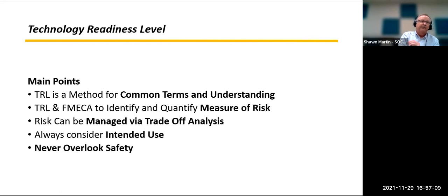You identify it first, you understand what the criticality of failure is, and then you manage it. It could be a trade-off. It could be you don't do it. Or it could be you do parallel development efforts. There's a lot of things. So you have to understand it, you have to know how to measure it, and then you deal with a trade-off, managing it.